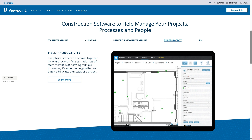Now let's go to field productivity. In Viewpoint Vista, it's designed to enhance real-time communication and task management on the job site, bridging the gap between field and office. You can submit daily logs including labor hours, equipment usage, and materials consumed. Punch lists and safety reports let you track issues, incidents, and resolutions digitally. For mobile accessibility, you can use smartphones or tablets to update status, photos, and notes. Labor productivity tracking lets you monitor crew performance and compare against estimates. For example, field supervisors can instantly log delays caused by weather or supply chain issues, allowing project managers to adjust schedules accordingly.